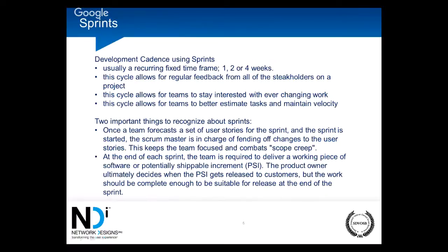But at the end of every sprint, you should have a PSI, especially as it gets later in the product. And that PSI is something that you really could ship out. For example, if it's a web-based tool that you're working on, and it's a tool that already has some maturity to it, and you're still running sprints because you're nearing toward the end of the project, you can theoretically ship out or release to the server the code that you just produced in the sprint.